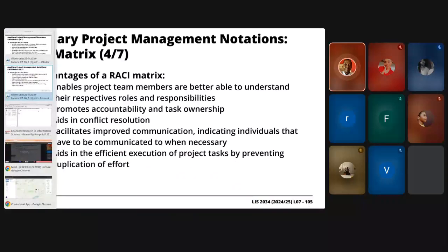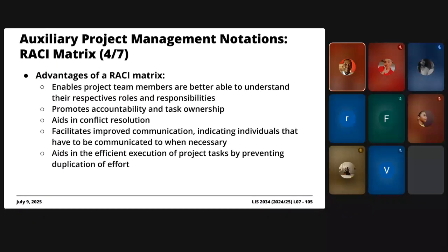let's assign roles and responsibilities as follows. Project member 1 and 2 are going to focus on the proposal document. Project team member 3 is going to look into identifying an appropriate tool to create the screencast and make necessary arrangements. Project team member number 4 and number 5 are going to work on the presentation slide deck. Project team member number 1 is going to be responsible for submitting the proposal document itself via Moodle. Project team member number 5 is the one who's going to be responsible for submitting the presentation slide decks and the screencast.